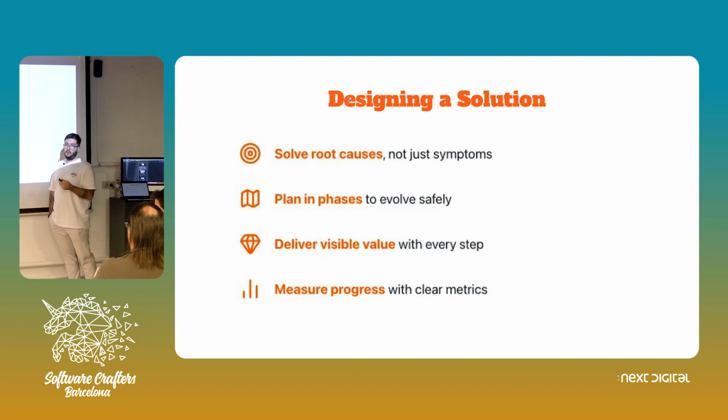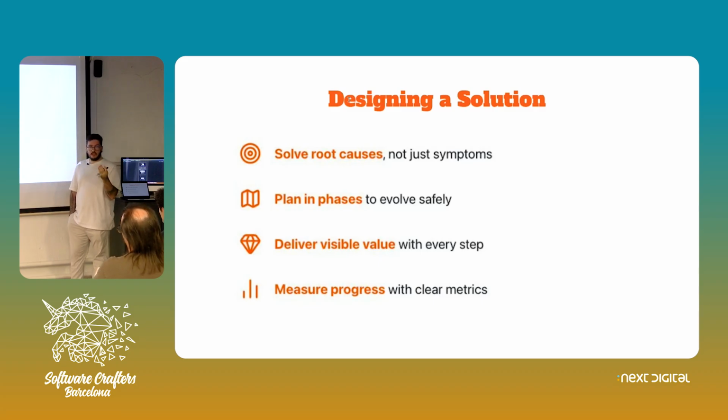One of the problems that we may find is that if we plan 8 months ahead of time, priorities shift. Things change. So you may be able to spend the 3 months as planned, then a 2-month stop because of something, then you go again. So it's important to have phases clearly delimited and ideally independent of one another as much as possible. The same way things change for the bad, they also change for the good, and sometimes you can attack 2 phases at the same time as well. So make sure you plan in phases.